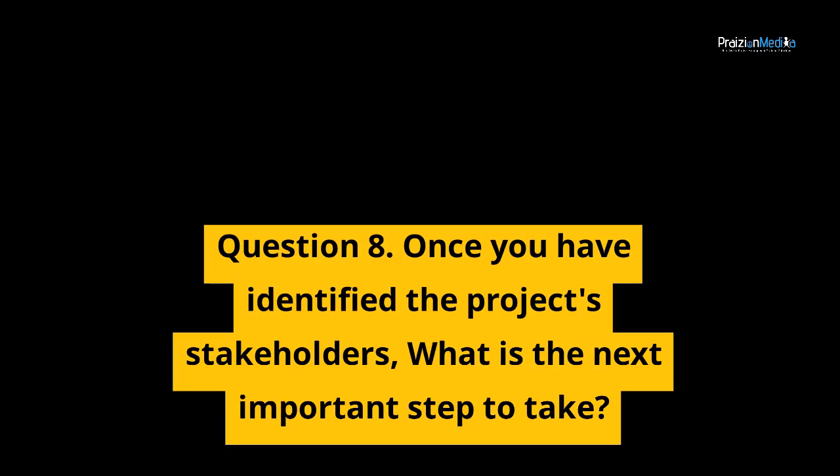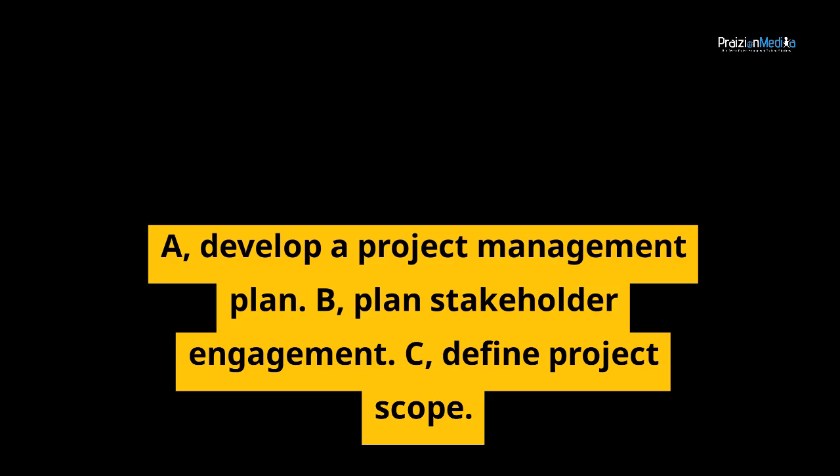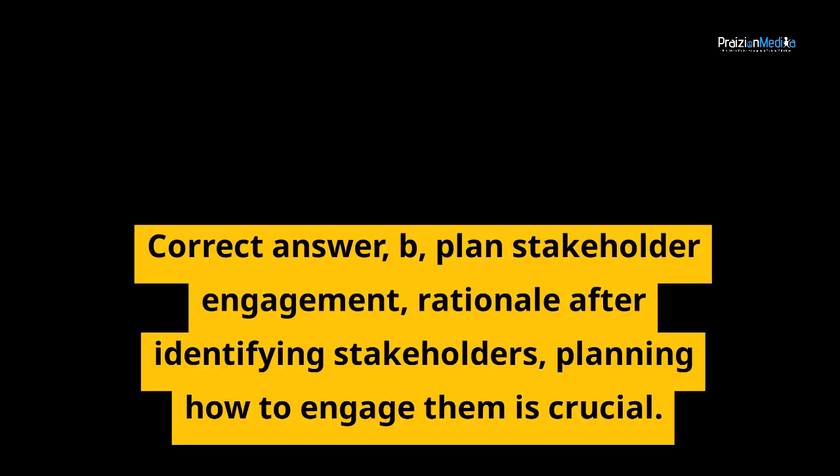Question 8. Once you have identified the project's stakeholders, what is the next important step to take? A. Develop a project management plan. B. Plan stakeholder engagement. C. Define project scope. Correct answer, B. Plan stakeholder engagement. Rationale. After identifying stakeholders, planning how to engage them is crucial.